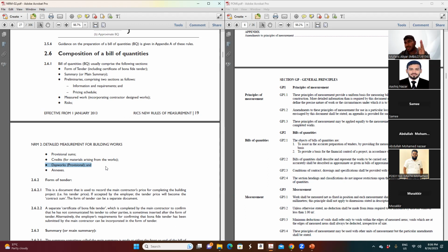during his working, maybe let's say after 2 years he's going to work. After he priced the BOQ, then after 2 years he's going to work. When you ask him after 2 years to give the rate, he will come up with a huge rate. For example, instead of 20 dirham, he will say 30 dirham. Then you don't have any option. You have to pay for it.